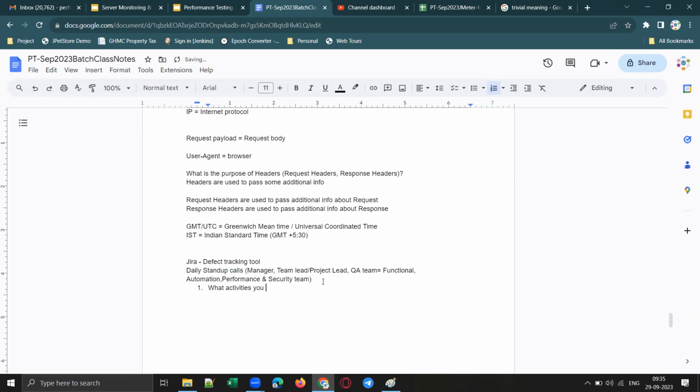What activities? Suppose if it is a morning stand-up call, generally you'll have stand-up calls in the morning time. So you need to tell everyone, every team member should explain what activities you worked on previous day. Even though you informed your manager, you should let everyone in the team know what you worked on yesterday and what are the planned activities for today. And yes, what is the third one important? You have three important agenda items.